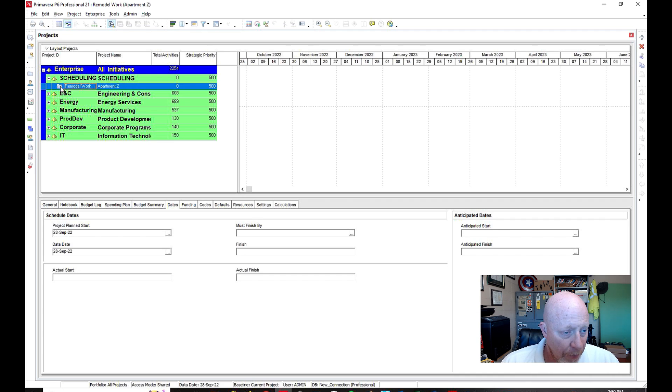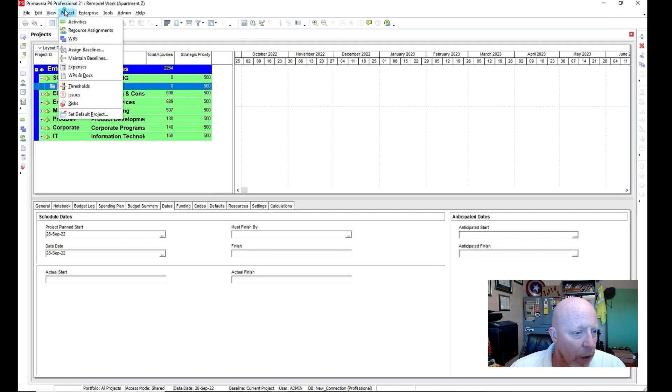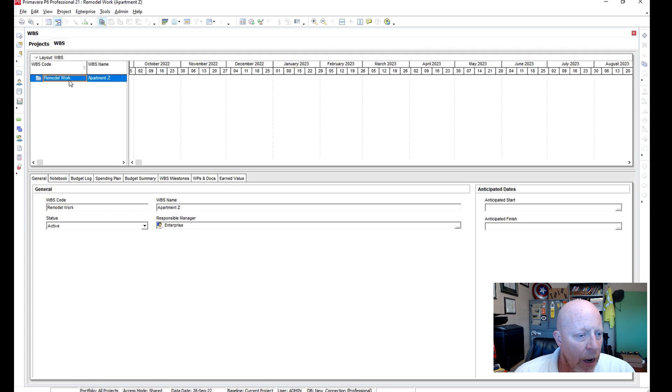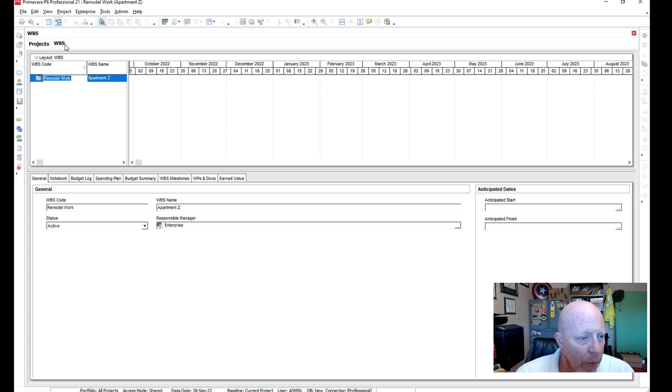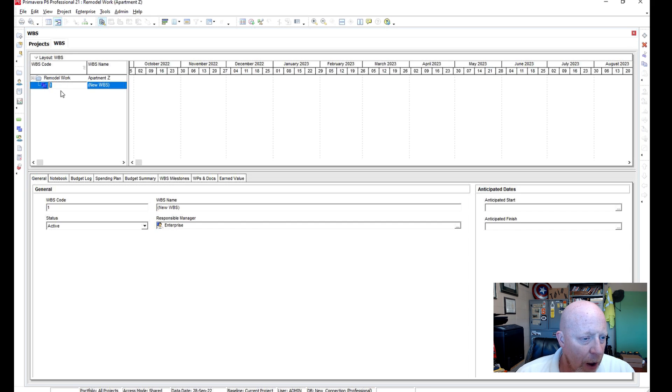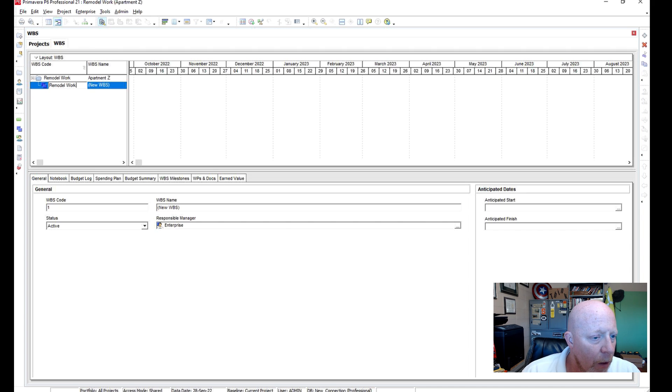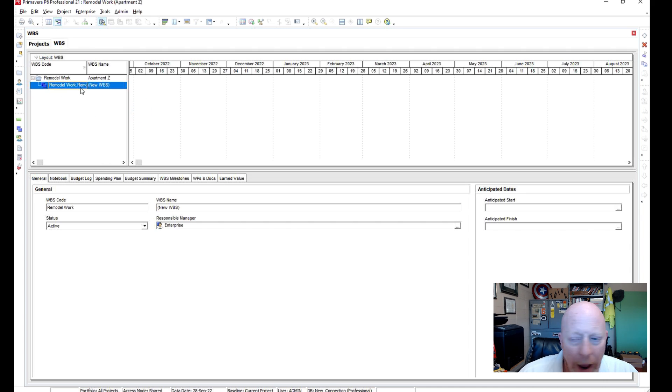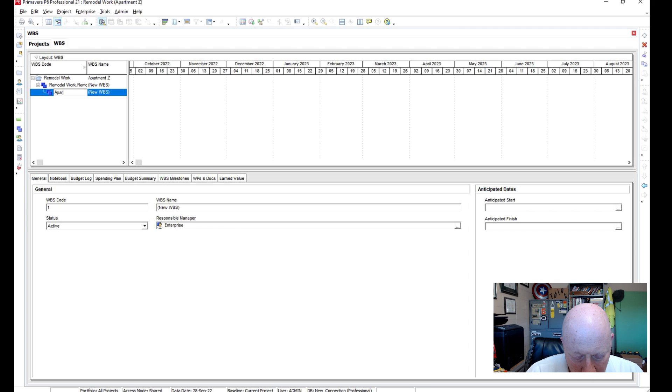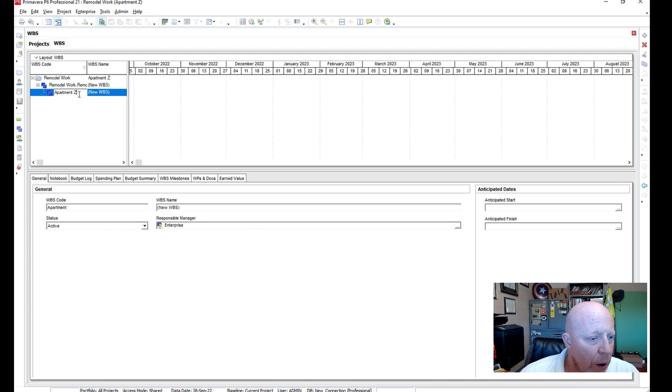So now all I'm going to do is, I'm going to come up here to Project, I'm going to say WBS. And once I have WBS, again, here's my folder. So I'm going to go in here to the top right, and again, I'm underneath the WBS heading, and I'm going to click the plus sign. Plus sign is going to put these little blue folders up here. So what I'm going to do is, I'm going to say Remodel, Remodel work, again. And once I have that, I'm going to hit plus again. And then now I'm going to say Apartment Z.